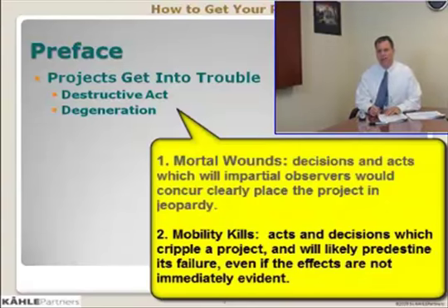And what we're talking about here are things like this. Project sponsor has agreed to a decision-making model where decisions will be made in collaboration amongst 5 people that meet every 2 months. Great. That means we'll get decisions every 2 months on things. That won't work for the project. So basically, while that decision-making model seemed to meet the needs of the sponsor and the other stakeholders that were participants in the project, they have effectively just killed the project at its start. And other types of decisions such as that, which take a while to manifest themselves but have the same effect upon the project, they basically kill it off at the beginning.